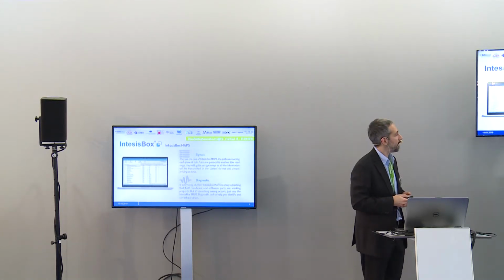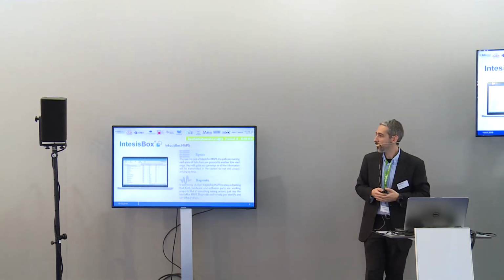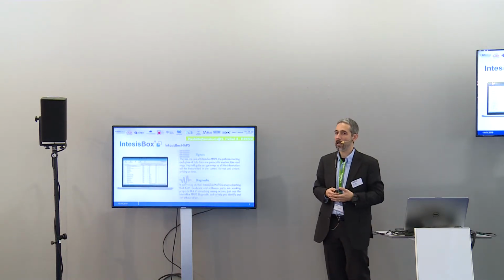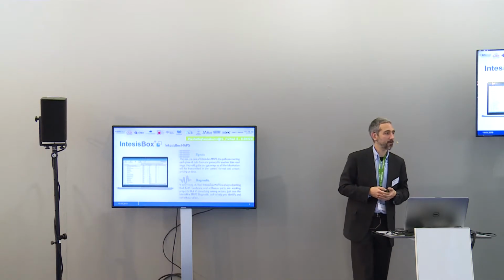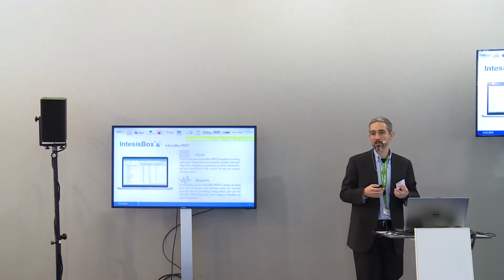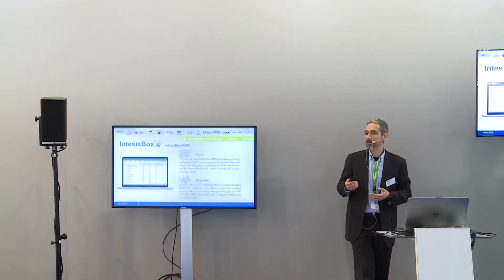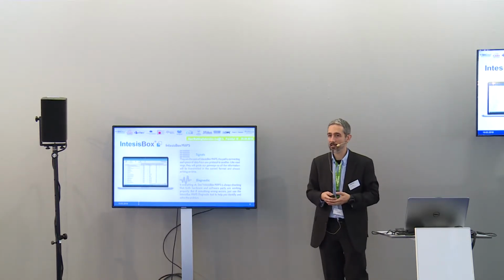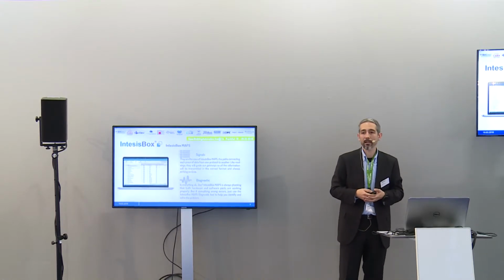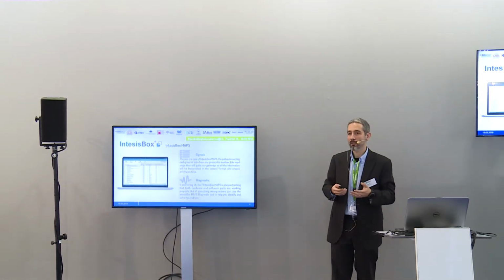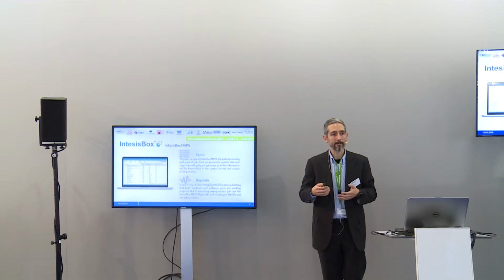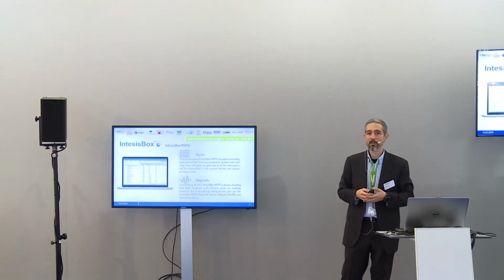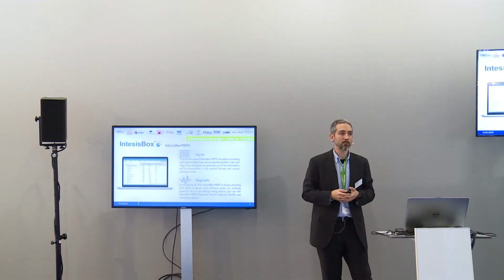Apart from that, another thing that we offer as well is a diagnostic tool, which is embedded in these maps. That provides the integrator with two useful things. The first one is that, once you are in the installation or commissioning process, you have the chance to check that everything is working, and in case something is not working as expected, you can check the bus communication in both protocols, the internal one and the external one. So it's easier for everyone to see what's going on.